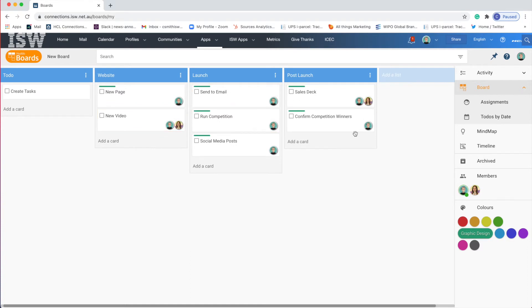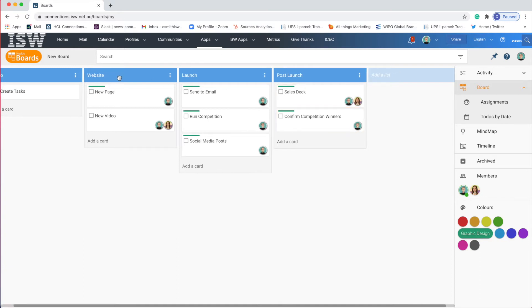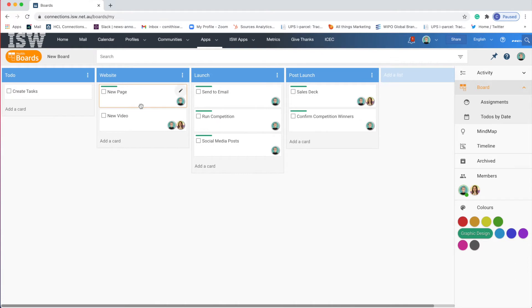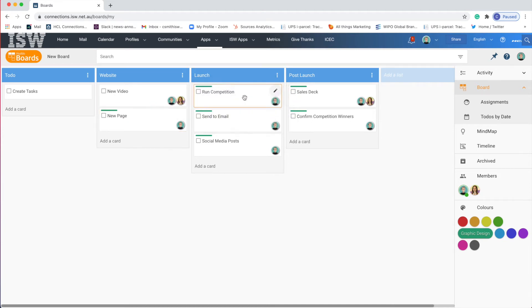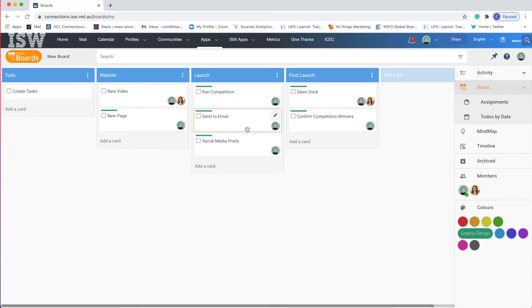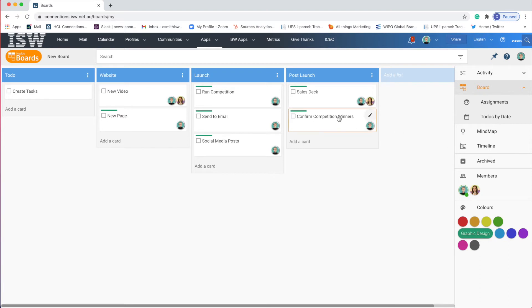So of course I don't have too many tasks here so I could think okay what order am I going to do this. Obviously probably website, launch, and post-launch but what about the tasks within them. So here you could say well actually if I do the new video first that will go on the web page. Likely if I run the competition I can add that competition to the email and social media posts. So you can just change your order by drag and dropping. But I would say a more powerful way of managing dependencies and order of tasks is to use due dates and start dates and end dates. So my next pro tip is to actually do this within timeline.